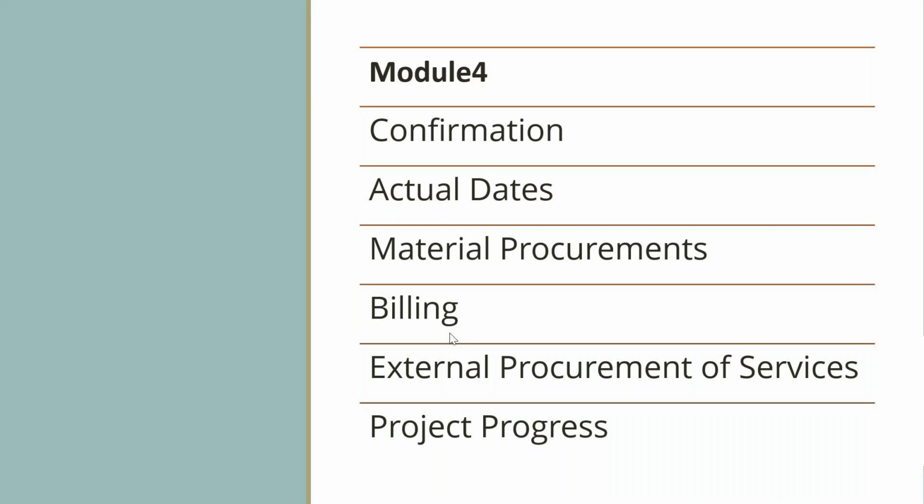It will remove the billing blocks in SD, in the sales order, in the billing plan tab. We have different concepts, like assembly processing, and this is milestone billing. Likewise, SD will raise the bill, do the billing, and the costs and revenues will flow to SAP, I mean project systems. And then either in project systems or in SD, we'll be doing the result analysis.